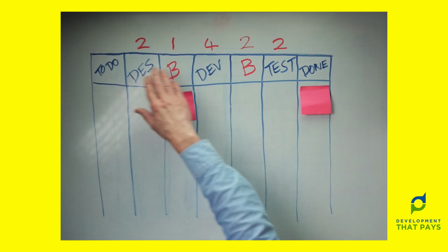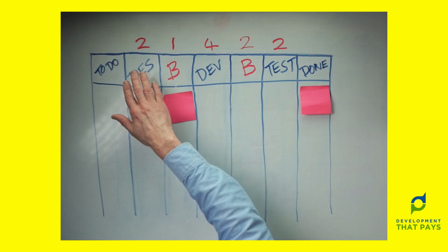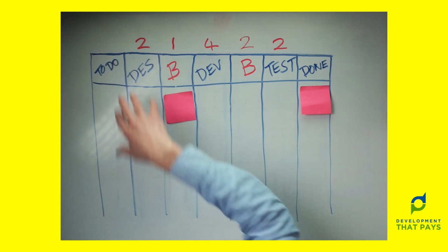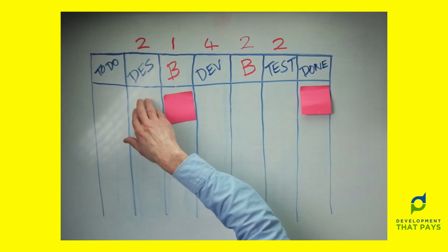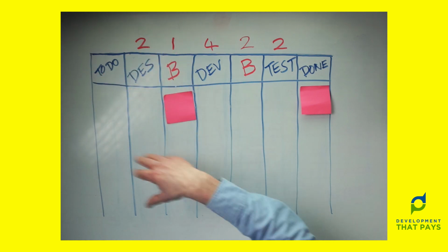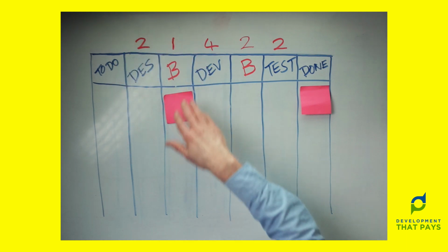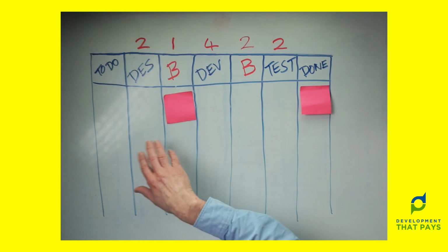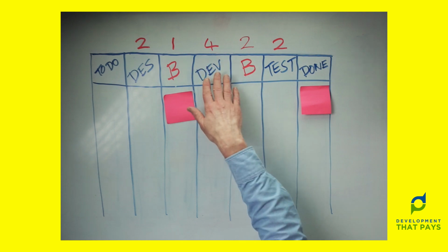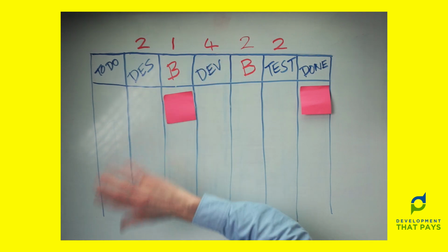All of those actions were in design's control. Everything that we did here, pulling it in and moving across to buffer, is in design's control, and it therefore owns both of those columns. If dev owned this column, well, design would have been messing with it, and that's not what we want.